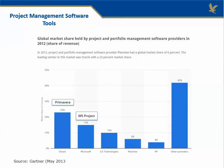Let's take a look at some of the tools that are out there. This is from Gartner in May 2013. If you look at the top project software tools used by industry, number one is put out by Oracle and it's a package called Primavera. The next is MS Project, and often in large companies the server version is used. Then there's CA Technologies, followed by PlanView, HP, and then other providers.